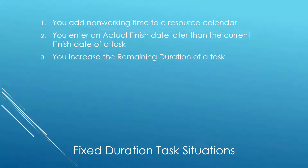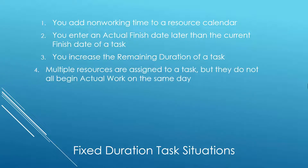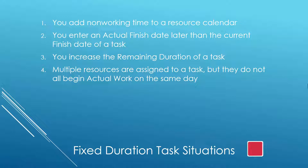Three: you increase the remaining duration of a fixed duration task. Four: multiple resources are assigned to a fixed duration task, but they do not all begin their actual work on the same day.